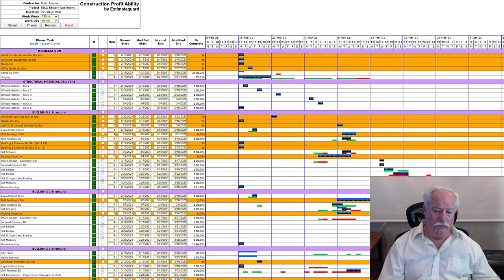This customer was savvy enough to know that they've had these issues in the past, and they had the money in the project to go this direction. And at the end, of course, they did have to settle up, and it cost them a little money, but I beat my electrical budget, created a windfall there, and they battled through their issues on who was responsible for what. Basically, the subcontractor didn't make any money on the project.